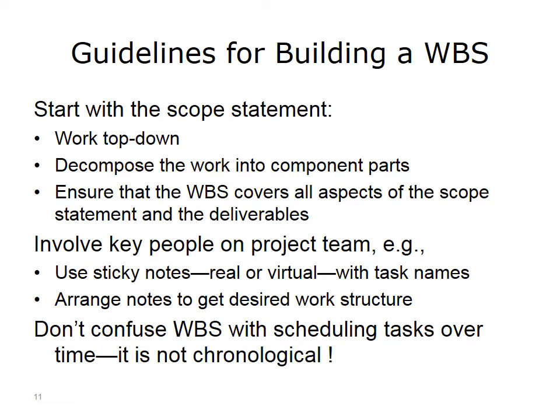Here are a few guidelines for building your WBS. One way to start is with the scope statement. Take the requirements from the scope statement and decompose them into component parts. By doing so, you have some assurance that you're covering all the elements that are defined in the scope statement. The deliverables that are discussed in the scope statement will be addressed in your WBS.